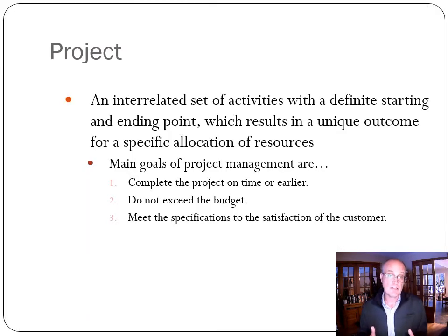So what is project management? A project is a set of interrelated activities with a definite starting and ending point, which results in a unique outcome for a specific allocation of resources. Think of an example where you are building a house and there are activities where you clear the lot and you dig the foundation and then you pour the cement and then you frame the house.